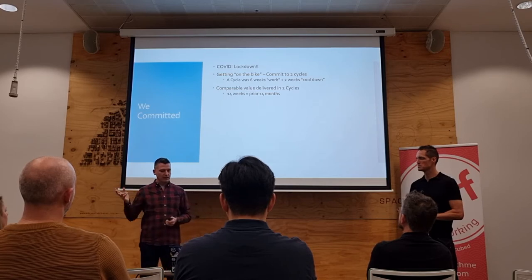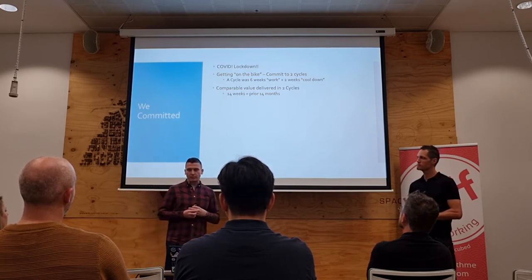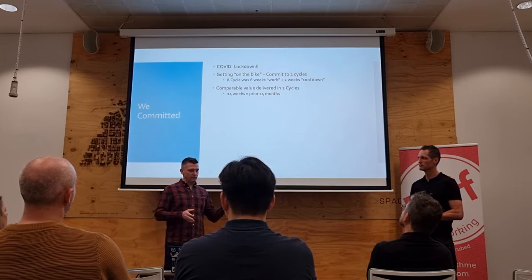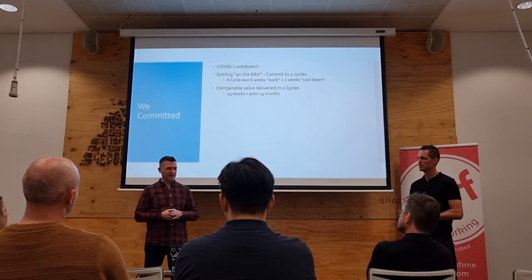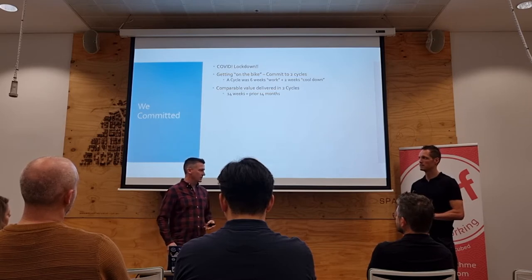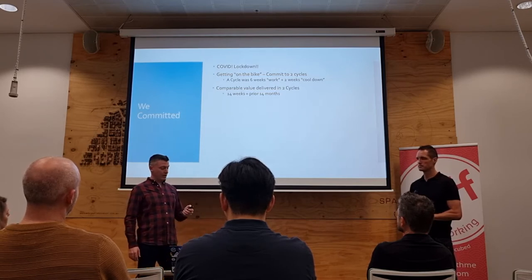So jumping ahead a little bit, at the end of the first two cycles, we took stock and reported back on how we did. Just a rough heuristic: in the space of 14 weeks, so 6 weeks plus a 2 week cool down break and another 6 weeks, we delivered as many comparable features as in the previous 14 months, so roughly four times better. In two cycles. It was crazy.